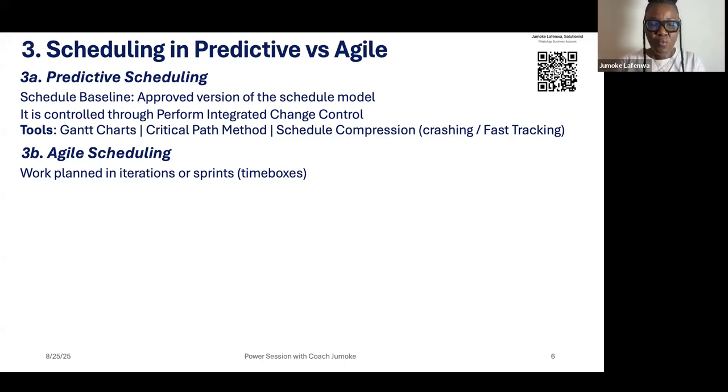So it means when they pick the value or user stories from the product backlog, and they break it down into the work to produce them, which will now become the iteration or sprint backlog, they have 3 weeks if their sprint is 3 weeks, they have 4 weeks if their sprint is time boxed for 4 weeks, they have 2 weeks.